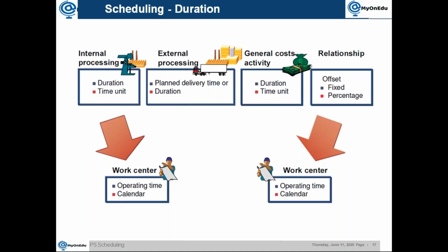It doesn't mean you have to use only one factory calendar. You can have n number of factory calendars. So maybe you have Z1 for your normal duration, it means 5 working days. Then you can have Z7 or something like that, which is called 7 days working. So maybe Z5 for 5 working days, Z6 for 6 working days, Z7 for 7 working days.